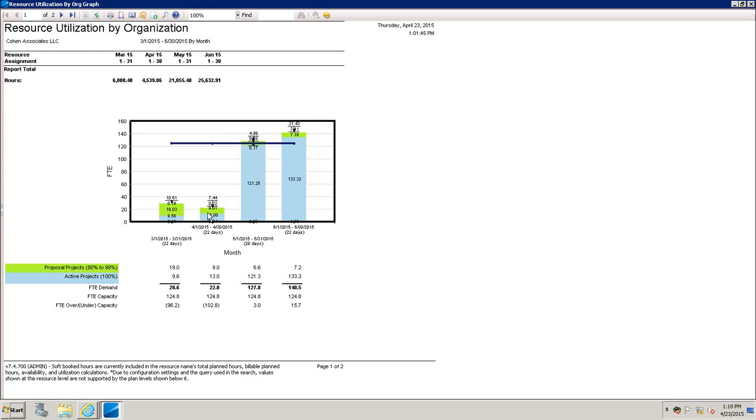As you can see, we have this little green bar here, and what that represents is the very likely projects to come in. That's referencing that probability field that we showed a bit earlier. With the blues, these are active projects, contracts in hand. These are going to happen. So we can have multiple scenarios here where we can see, show us everything that we're going to win, everything that's out there, or everything we're very likely to win, or the sky's falling, only things that we have contracts in hand for. Or perhaps even taking this a step further and being able to say, only show this for my junior civil engineers to make sure that I not only have the right head count, but I have the right mix in order to get these jobs done as effectively as possible.